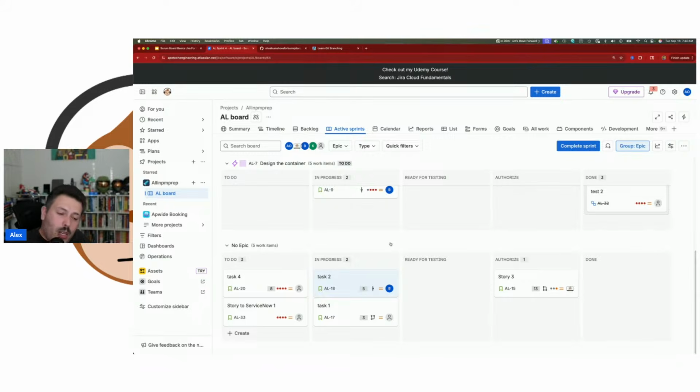Whether they're doing it right or wrong, I can't tell you that and I can't help you there, but just know that developers are actively working on this as long as you're seeing commit messages come through. Again, red flags: if you stop seeing the commit messages come through, that's usually going to be a key indicator that something's going wrong, that the developer's stuck or they got pulled off to something else, which is all the red flags that as a Scrum Master I care about, right? I care about when stories aren't progressing through the board. And so you want to watch for these things, right? You want to see what's going on here and understand and see how you can help your developers.